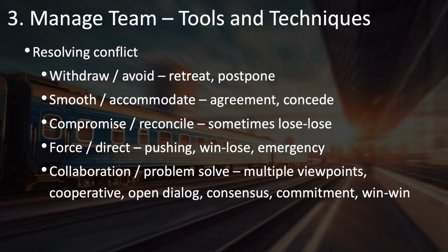Then you have force or direct as an approach. This, on the other hand, is more of a win-lose approach, in which you enforce a certain resolution without taking the time to try and compromise or reconcile or collaborate. This sounds like it might never be appropriate, but it actually is when you're in, for example, an emergency situation, and it's critical that this be resolved quickly, and you don't have the time to really explore your options. You just need to decide right away. And so you have to come in and intervene and take charge.